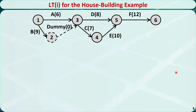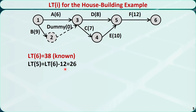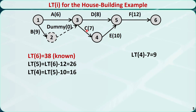Now assume that we know the late time of node 6 is 38 — it is the end time of the entire project. For node 5, the late time equals the late time of node 6 minus the duration of activity F, which is 26. For node 4, the late time equals the late time of node 5 minus the duration of activity E, which is 16. For node 3, the late time has two options: the late time of node 4 minus the duration of activity C equals 9, and the late time of node 5 minus the duration of activity D equals 18. We pick the smaller value, 9, as the late time of node 3.